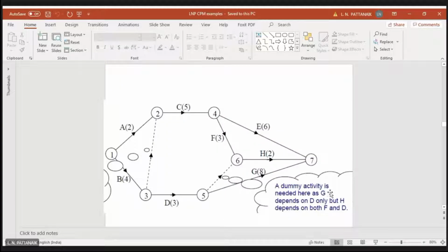Okay, so this is the nicely drawn network diagram. No need to write these comments and all that, just the activity and the time estimate near it. You can sequentially number the nodes 1, 2, 3, 4 in ascending order. And you see all the conditions given in the precedence table are now satisfied.